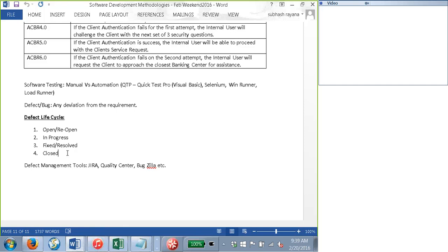I used to start the call and review each and every defect, starting with the priorities and the severity. I would identify each defect, understand what it is, and make sure that it is a valid defect. In some instances, the testing team, without even knowing the requirements, go ahead and report it. As a BA, having written the requirements, I should be able to validate whether a defect is really correct or not. There could be false alarms as well. So my role was to validate the defects on the call, and if there is an invalid issue, put it back to them. Make sure they understand, give them clarification on the requirement if they need it, and take away all the open defects and assign them to the respective development team.